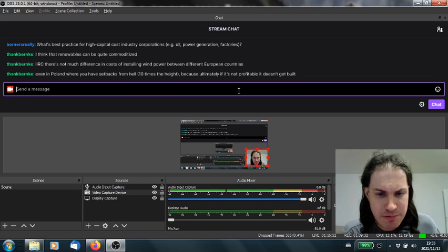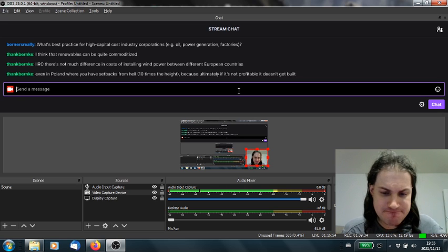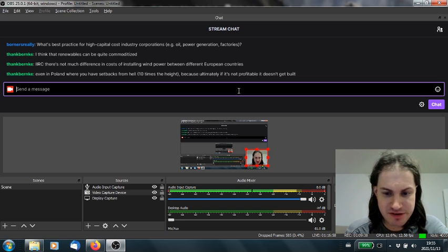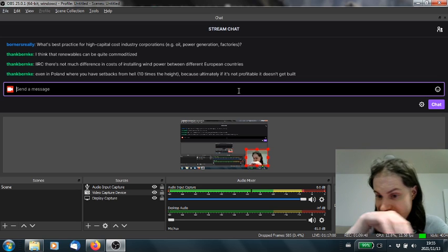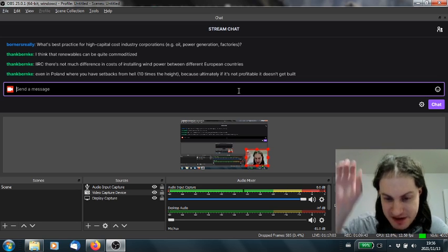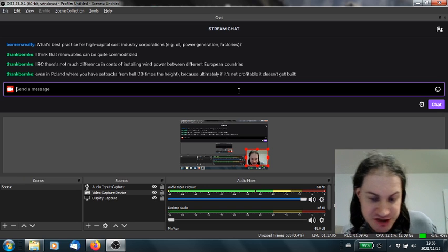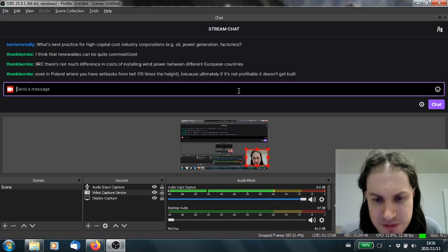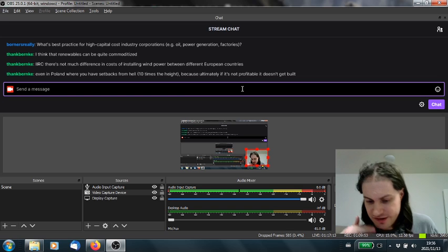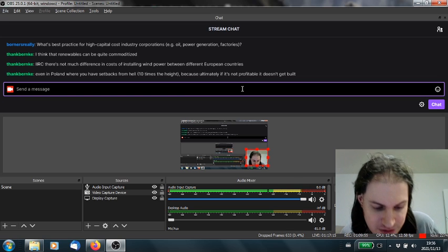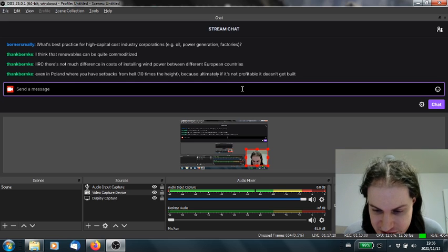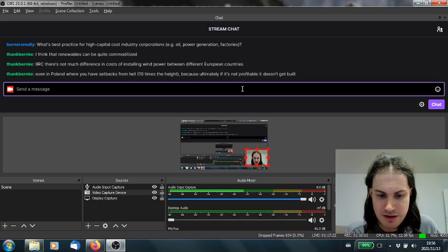So in practice, the way it works is that in Italy and in Spain, they don't have this kind of codification of 60% design. It's design contract, then the builder can make little changes, and it's all itemized. So if little changes are being made, then the cost of these are already known, and if there are little changes due to unforeseen geology, well, yeah, that's fine because it's all itemized.